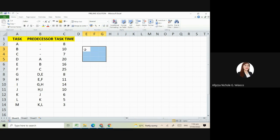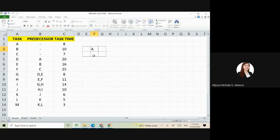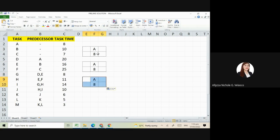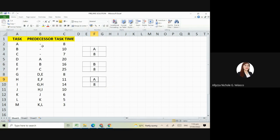This is letter A having 8 days. Next is letter B. They will have the same line since they all have no predecessor. This is B, this is C. This is 10 and this is 7.